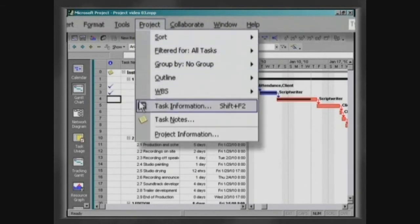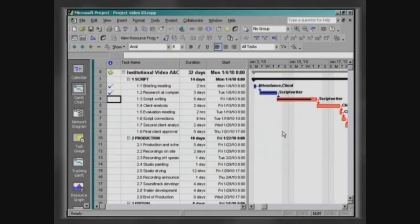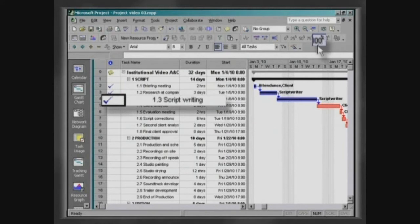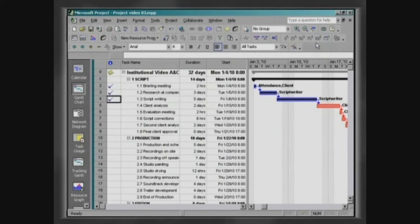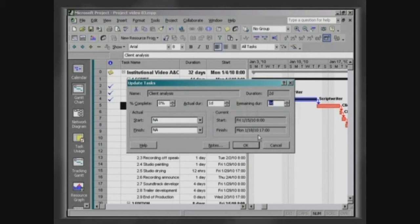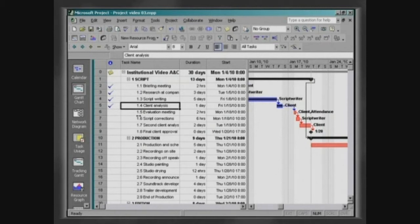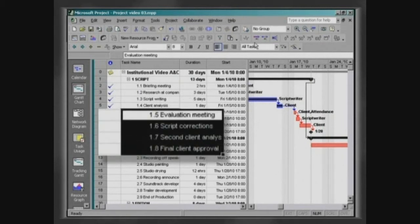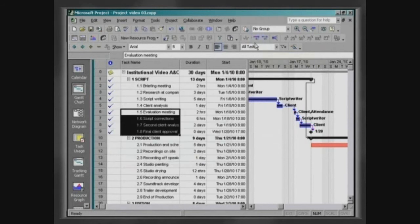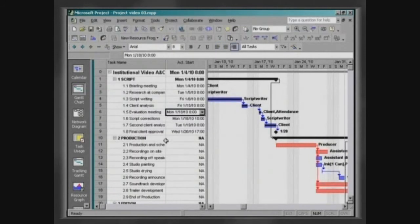We will now update the project for the date of January the 20th. The task script writing has been concluded. The task customer analysis has taken just one day. This reduction has cancelled out the project delay. The other tasks have been performed as scheduled — select them and click on Update as Scheduled. Click on View, Table, Tracking. You can also monitor the progress of activities using this table.